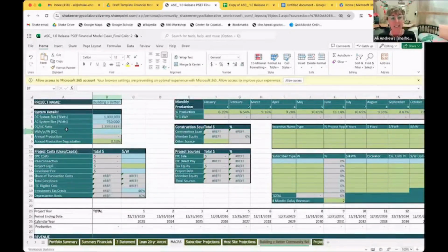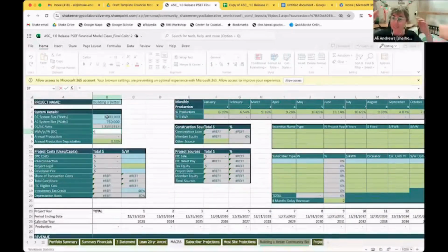Now this is asking for the production, the annual output of the project. If we've got a 1 megawatt project, let's see, ooh, this is going to be good math for us to calculate. A good ballpark that I use is a solar array is productive for about 5 hours of the day intensely. It's more productive in the middle of the day and a little bit less productive on the tails of the day.